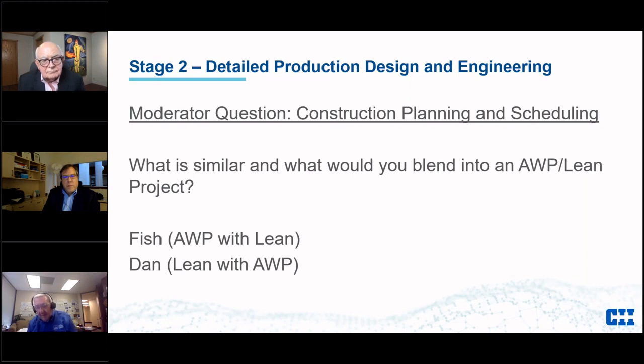And like you said, Dan, things in the field are going to change on a daily basis. They really do. So we've got some priorities of pipe and everything. My inspectors are going to keep my expediter informed that they are working on the right things at the right time. And then guess what? The field comes up and says, there's a big rain and we're going to be washed out over here. We're not going to be able to work in that area for another 3 weeks. But if we could get this pipe over here, we could shift our crew over.